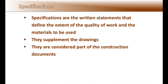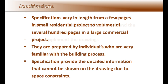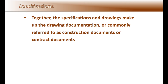Specifications are the written statements that define the extent of the quality of work and the materials to be used. They supplement the drawings and are considered part of the construction documents. Specifications can vary greatly in length, from a few pages on a small residential project to volumes of several hundred pages on a large commercial project. They are prepared by individuals very familiar with the building process and are seldom written by just one person. Specifications provide detailed documentation that cannot be shown in the drawings due to space constraints. Together, the specifications and drawings make up what is commonly referred to as construction documents or contract documents.